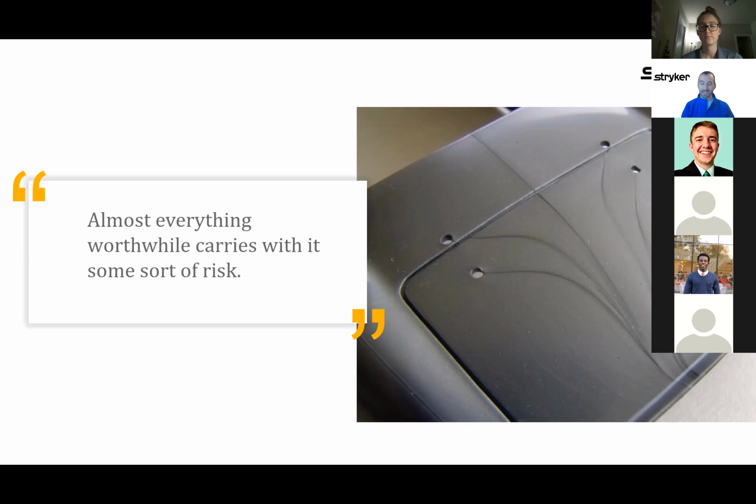So what we did beforehand, because we saw it a lot, was we have testing at the end of our product. So we need to test the product very rigorously to make sure that we're making a good product, right? You don't want to send anything out that you haven't tested. But we were concerned that when the tools were good, they would then go out to get textured and come back bad. So we ordered 2 times the amount of all the samples we would need, so that we could do our verification build with product that is basically the same, so that we could test it as well as we could in case something went wrong.